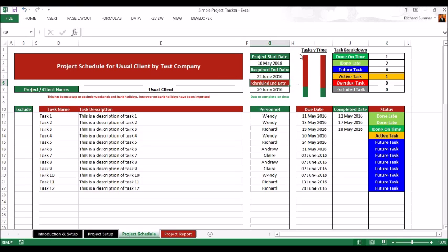These little things over here show your tasks, the number of tasks being completed, I'll show you there in a second, and the time. As long as this left one is more green than the right one, that means the tasks you've done are ahead of the time. If the green one starts to go up higher than this green, then you're actually a little bit behind on your tasks and you need to catch up.